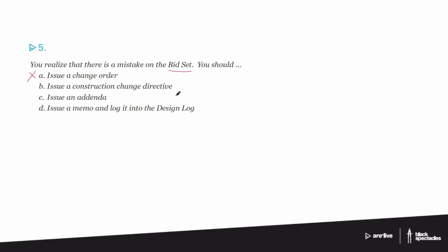But in order to keep the project going, we're going to have you still do the work. If we go through an arbitrator and they say, really, 50,000, that's crazy, but 1,000 was way too low too, how about 5,000? Well, okay, then the project is done by this point, and you pay the 5,000 instead of the 50,000 and instead of the 1,000.